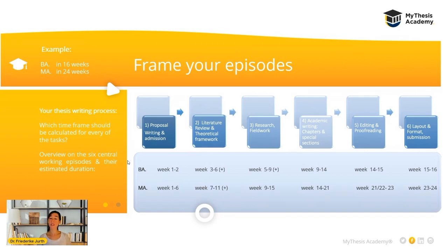it is a good idea to make a kind of check, start to read some pages and stop the time, just to know more or less how much time one full page will take you to edit and to correct. And then if you know how much time 1 or 2 pages will take you, then you can also make a kind of estimation for the rest.